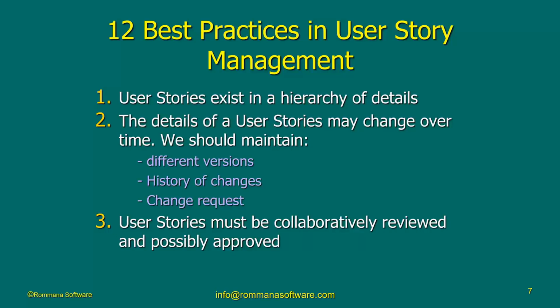A user story is written with certain things in mind, in the mind of the person who wrote it, whether it is a business analyst, a developer, or a product owner. But the details of the user story will evolve over time. That's why we need to keep track of this evolution of details. Certain things we did in requirements management must remain valid, and we must always do them in user story management. Those are maintaining different versions of the same user story, not a different user story. Keep that in mind. When there is a change in a user story, I don't want to have a different user story. I want to have a different version of an existing user story.